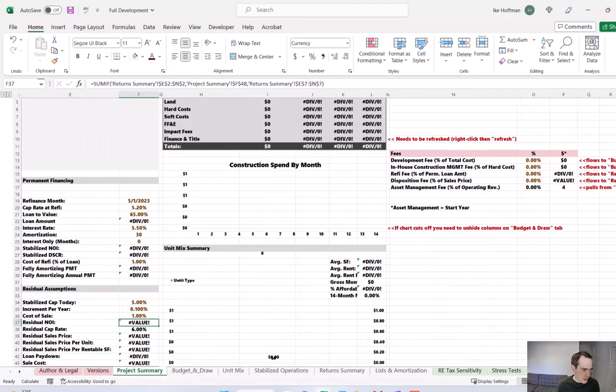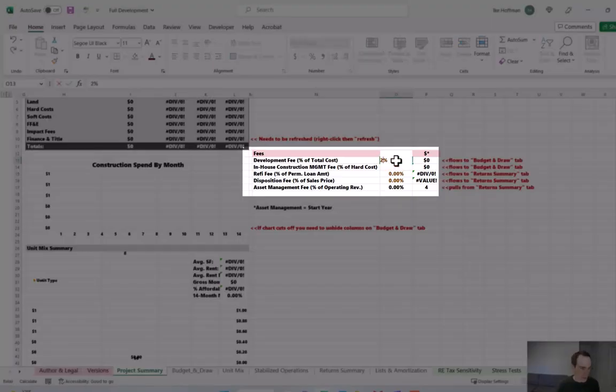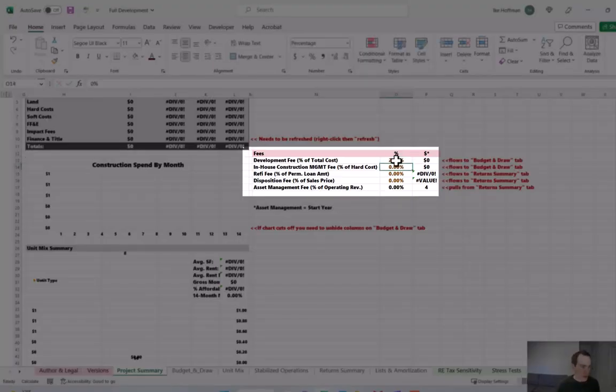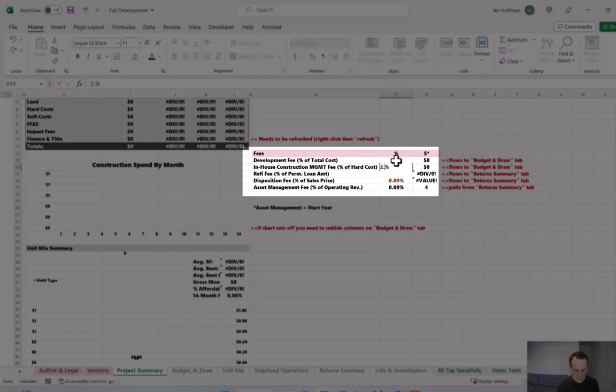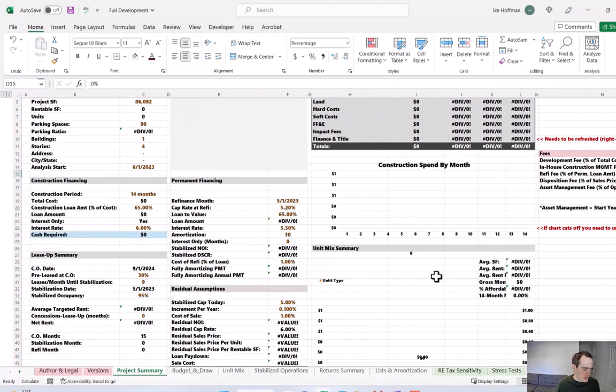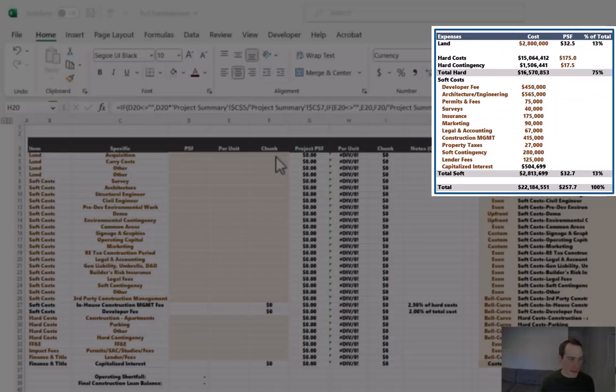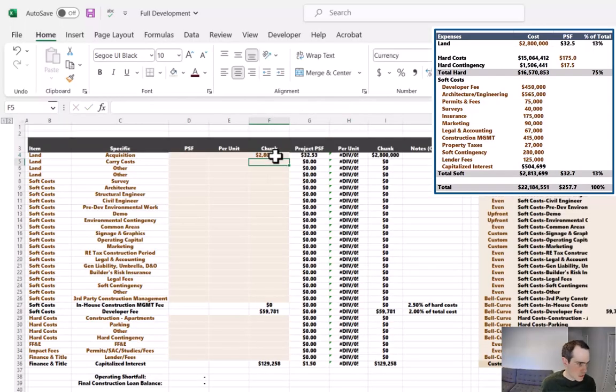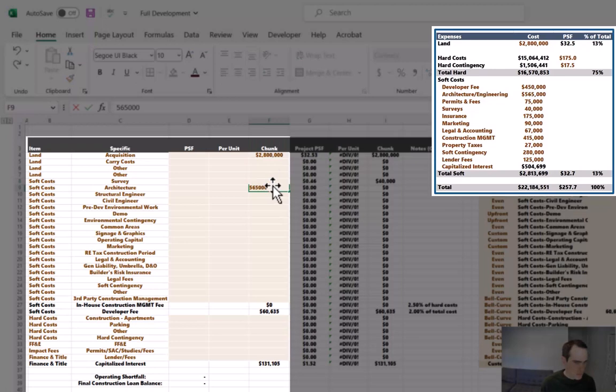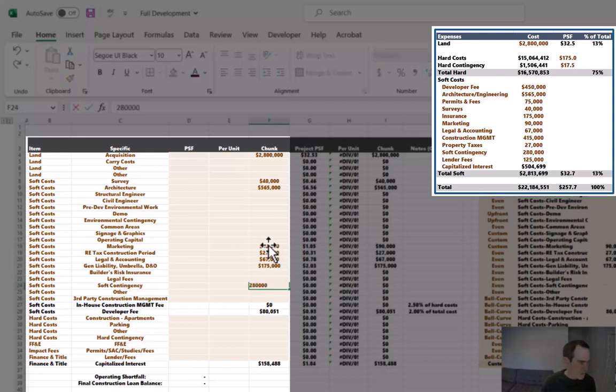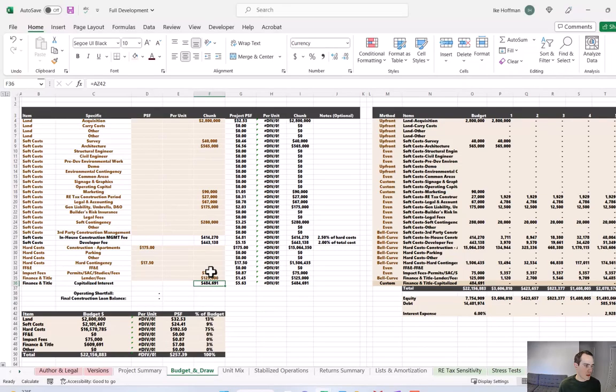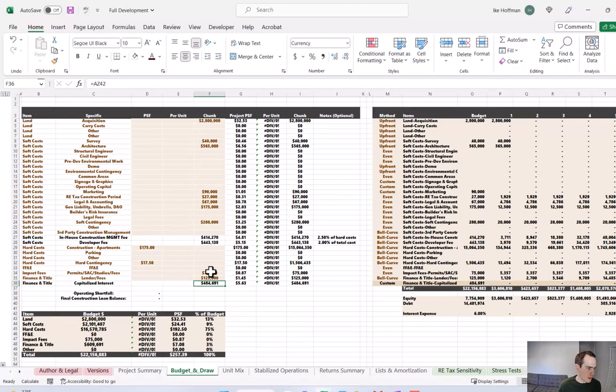I'm going to scroll over to the right and also enter in some fees that we will be charging. We're going to have a 2% development fee, which is a percentage of total construction costs. And then we're also going to charge an in-house construction management fee, which is a percentage of hard costs of 2.5%. We're going to revisit this tab. There's still a lot of errors and nothing's really calculating because we still have a ton of different assumptions to fill in. So let's move on to the budget and draw tab. Let's start at the top and begin inputting our vetted construction cost assumptions that we reviewed not too long ago. All right, so we've inputted all of our projected construction costs. And we can see the total down here equates to 22.16 million in total construction costs.